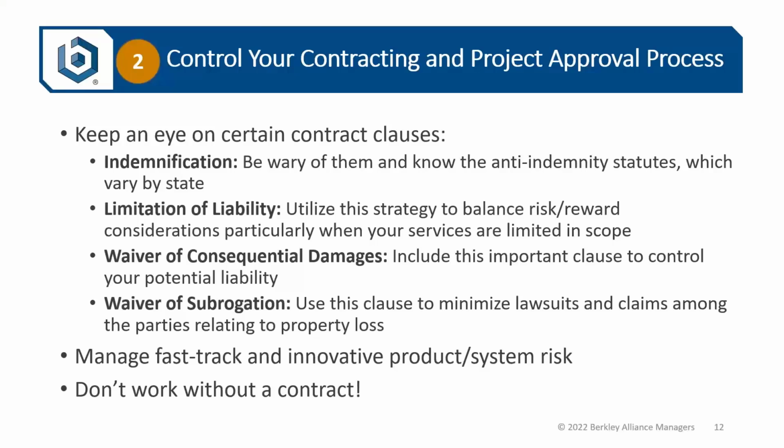They need to know that it's their risk to take that because they are benefiting from the acceleration of the project schedule. How much money are they saving to bring their commercial or revenue generating building to the market, 3 months earlier, 6 months earlier? They're saving a lot of money that way by generating revenue. So that's part of the risk that they have to accept.